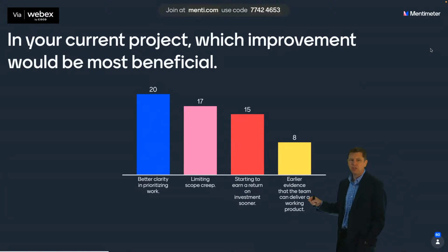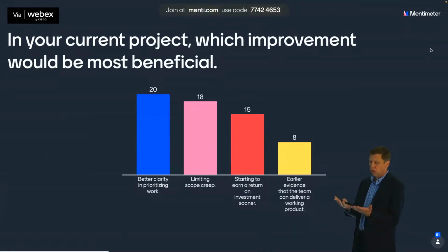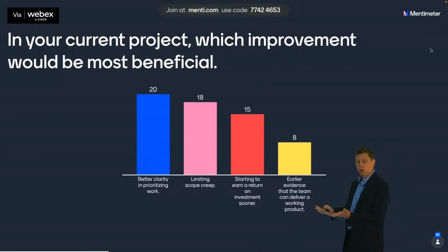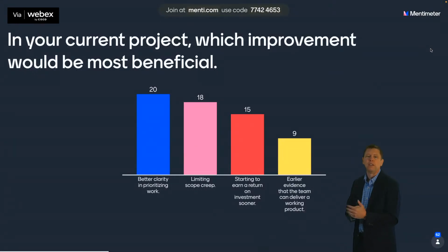it's going to be a lot easier to have clarity in prioritizing things. Because with every story you look at, you have to ask yourself, is there any way we could go live, we could make an MVP without this? And if the answer is yes, then it goes lower on the priority than something where the answer is no. I know it sounds really simple when you say that, but that's a really hard thing for teams to do. Teams that get good at it can be incredibly successful. Teams that aren't good at it can fail miserably.